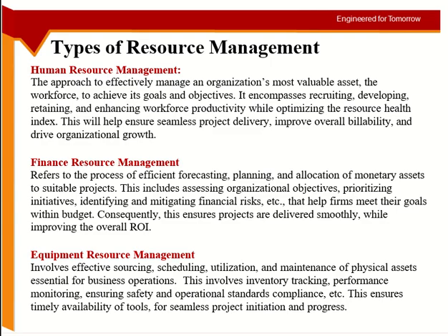So I have a project coming up. That project will need upfront 20,000 BD. Right now in my account I only have 15,000 BD. So this is a financial risk now. You have to start the project on time, otherwise it will be delayed. So how do you manage that? This is part of financial risk management. Look at something which you will need at a particular time, and then you look at your resources and you see. And the financial risk can be what can happen in the market.